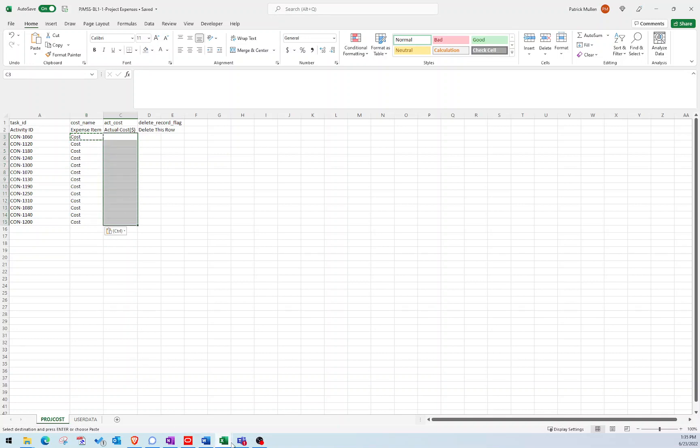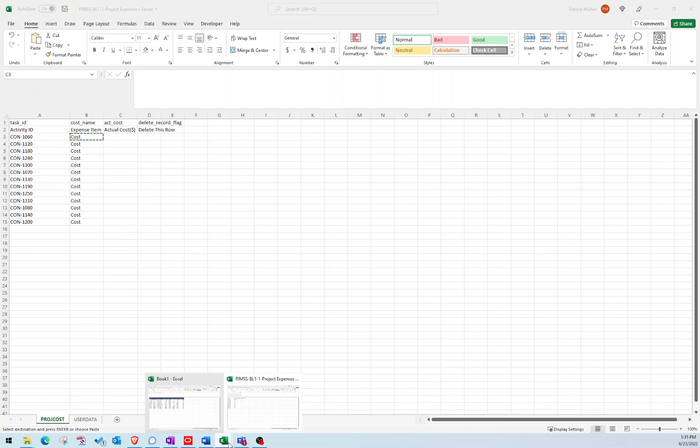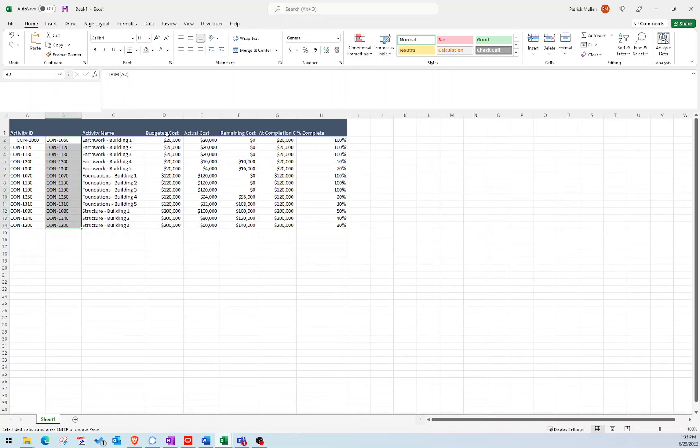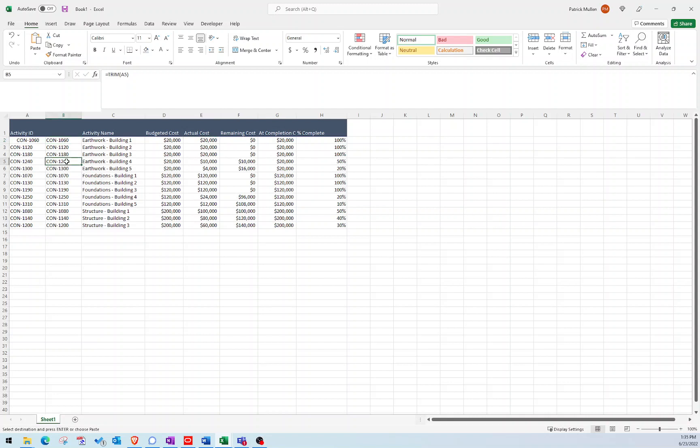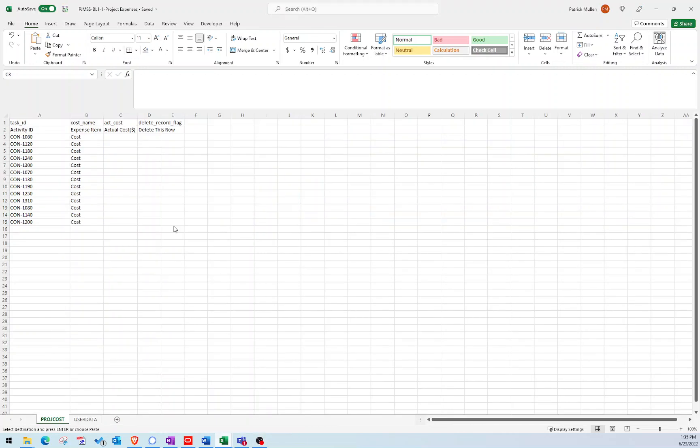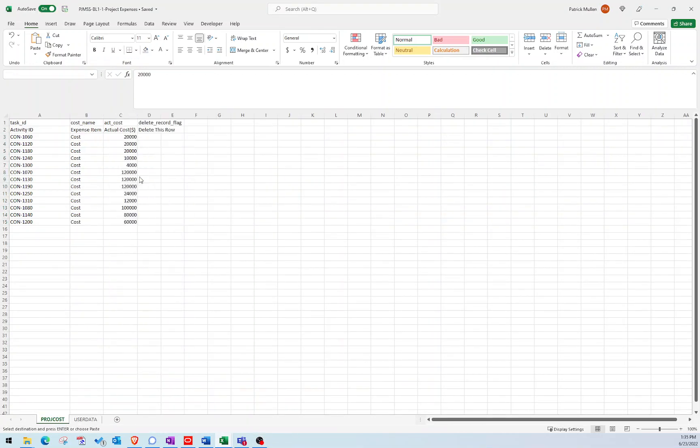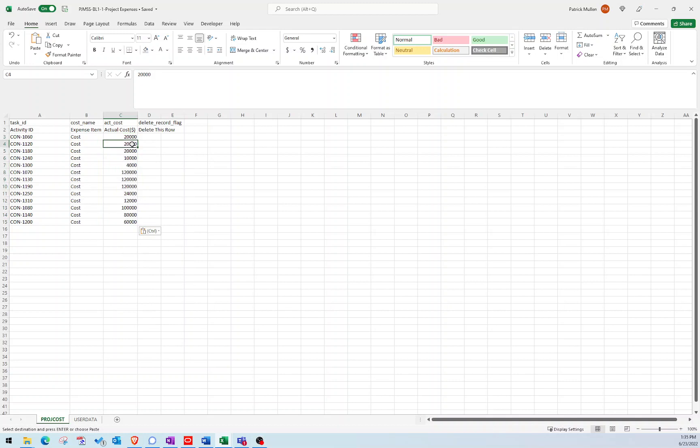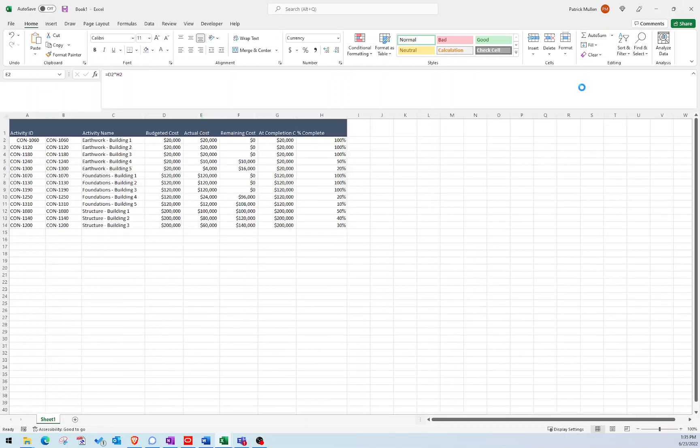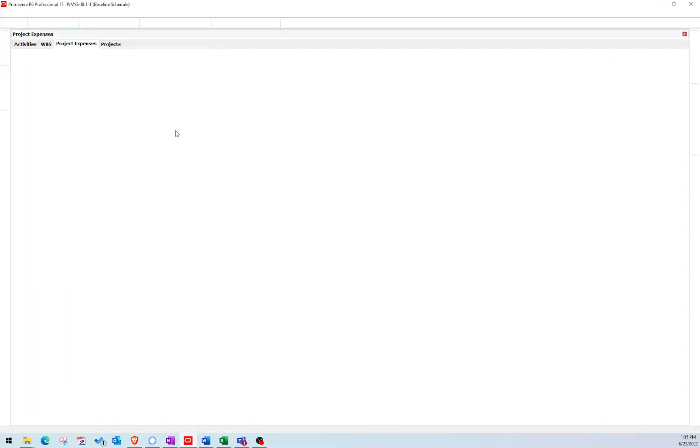So we've done our cost import and then I just need to bring over my actual costs. I just need to match what I have over here and make sure that for this 1060 activity it's $20,000, for 1240 down here it's $10,000. I just need to make sure that I match the dollar amounts exactly to the activity IDs as I want them imported. And I always like to just paste values so that way I'm not bringing over formatting or formulas or anything like that. So let's go ahead, we'll save this file, we can exit out of that, and then I can go back to P6.